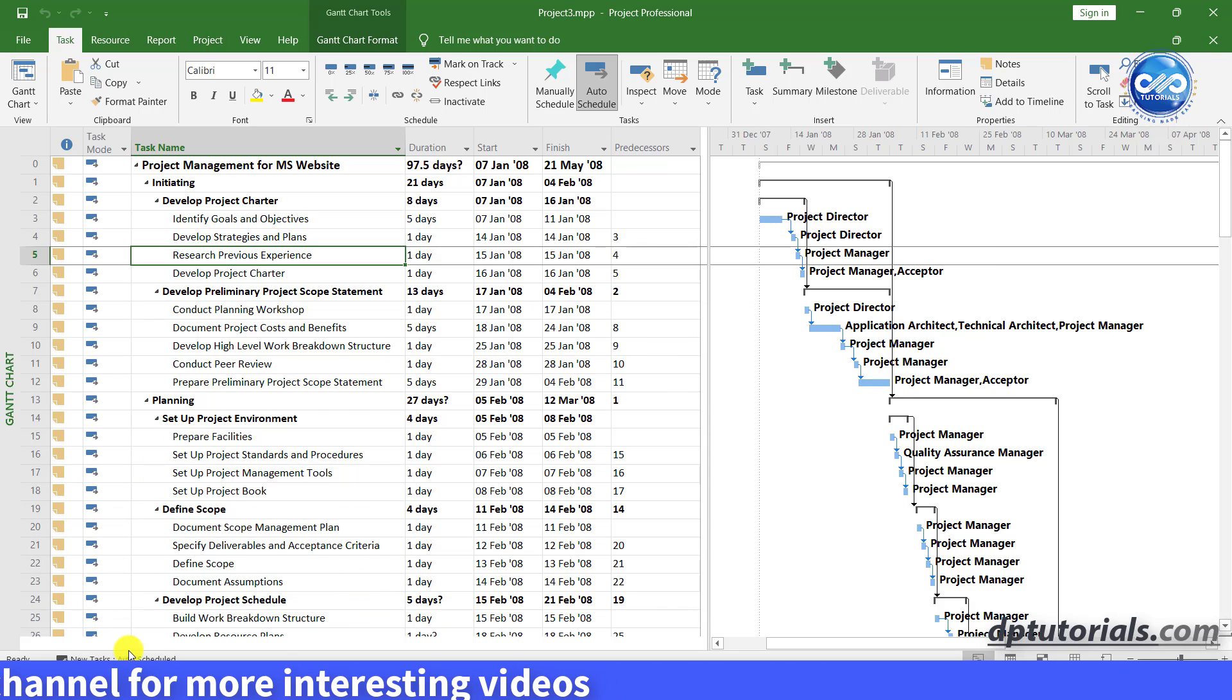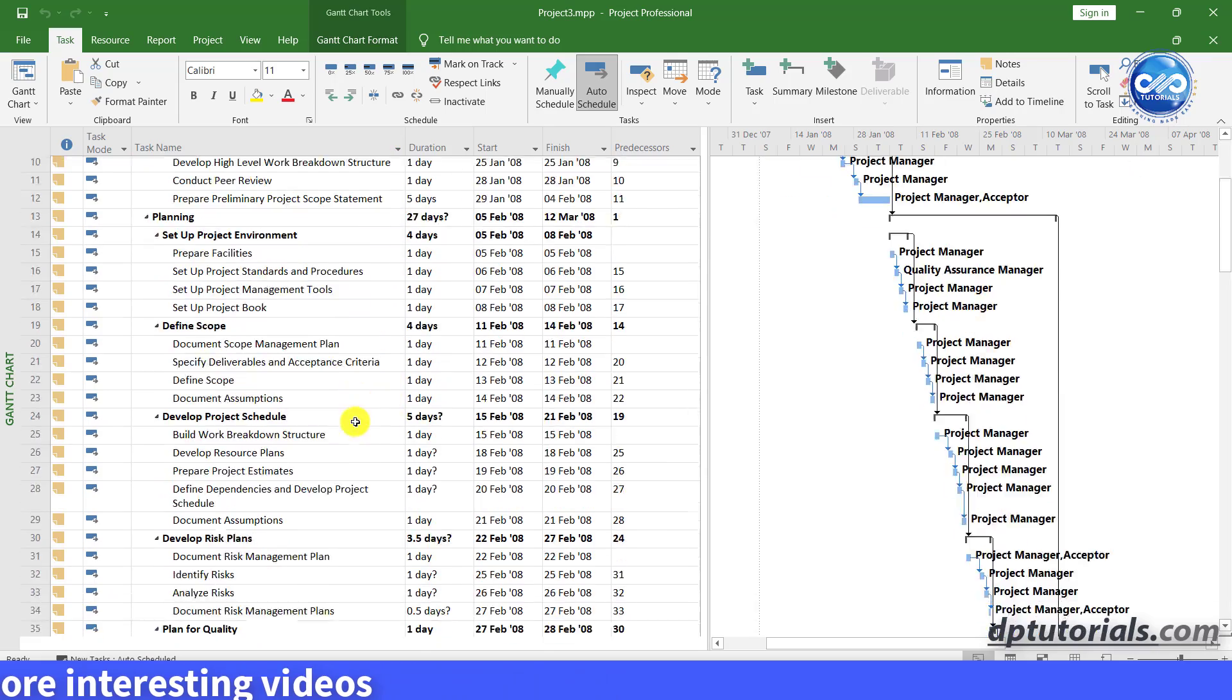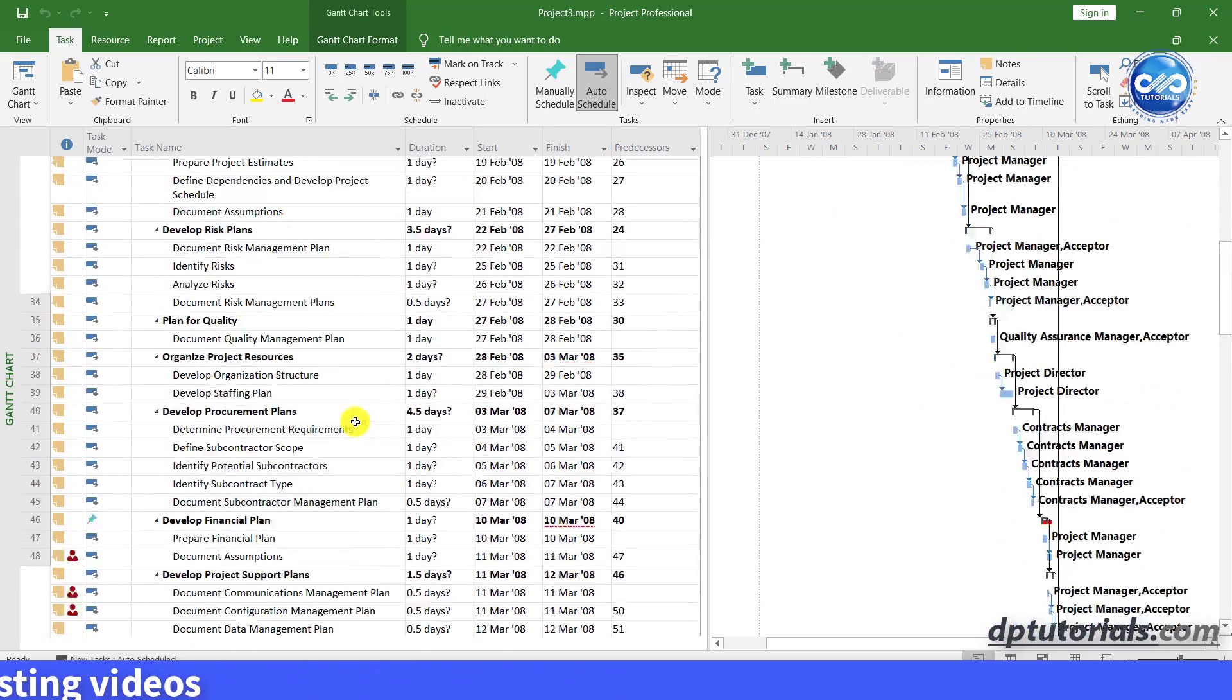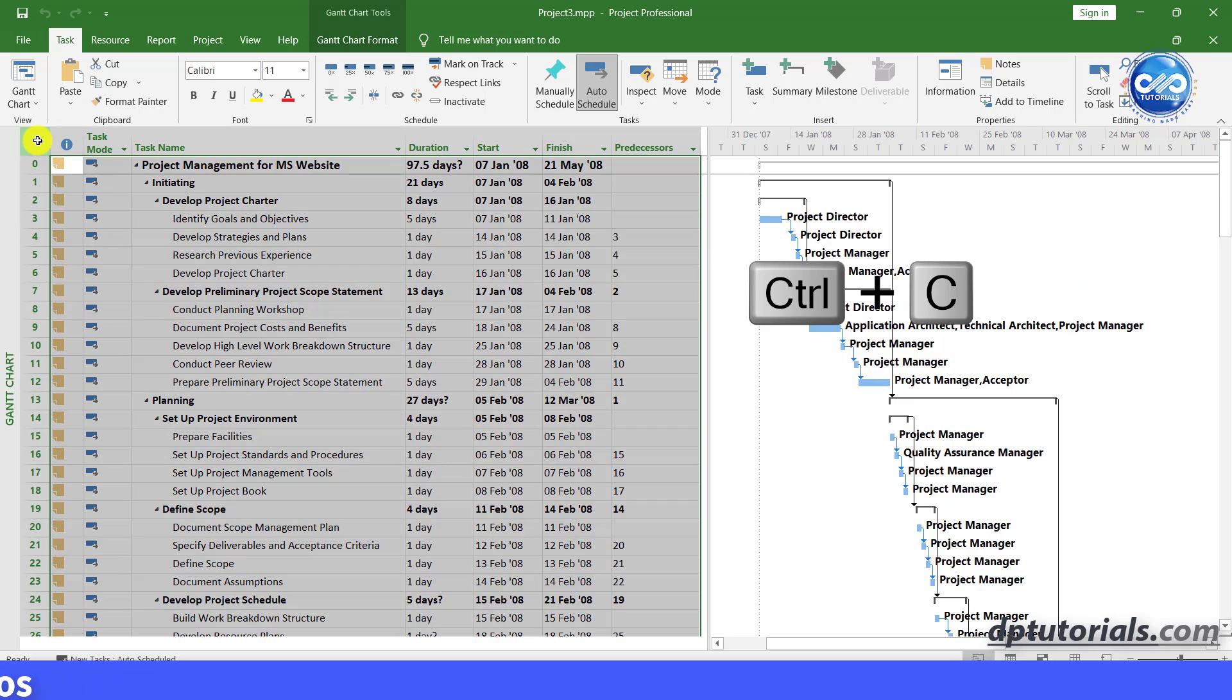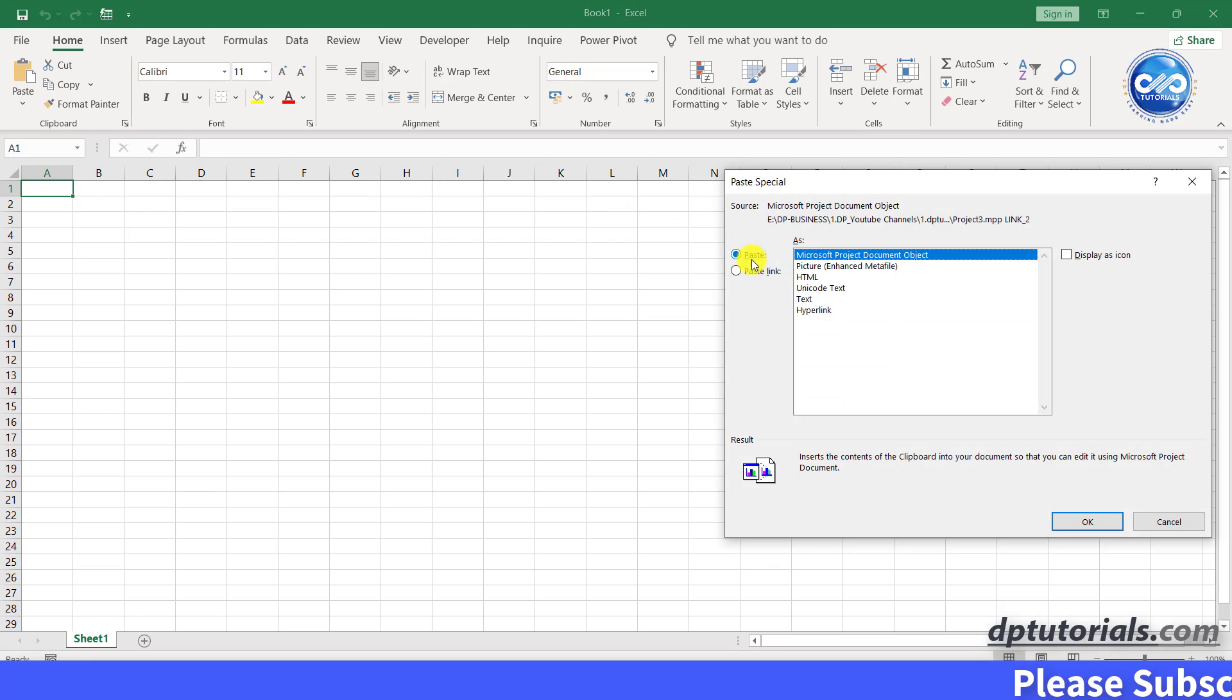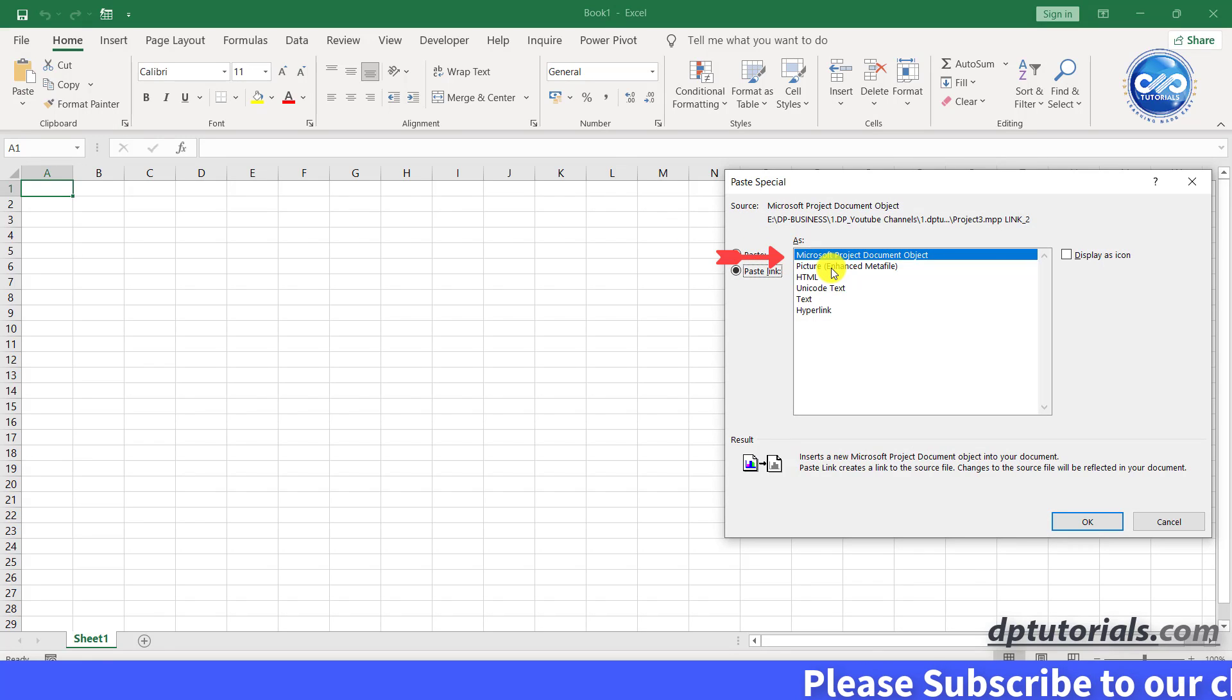This is my sample project that I would like to link to Excel now. Copy the entire data and go to Excel and paste special and select paste link and click on Microsoft Project Document Object.